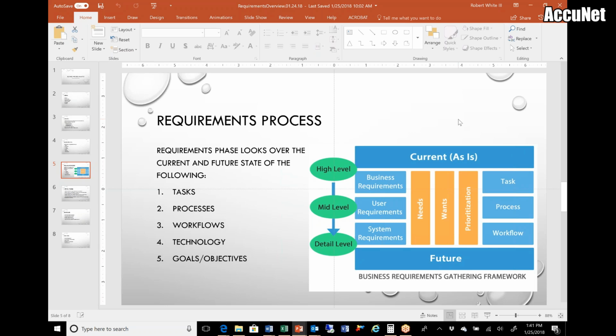And prioritization does change as you get into a future state. Is it a feasible option to automate finding a customer's information? That's a pretty hard task to do, and will require other integrations that would cost more money. You go down that rabbit hole on the automation side of it, and the prioritization goes pretty much to the bottom of the barrel.